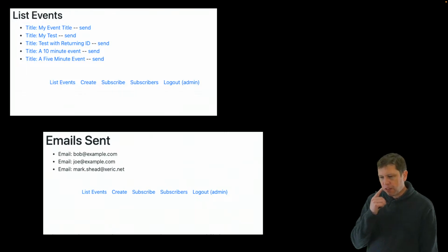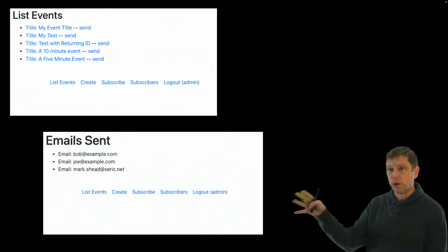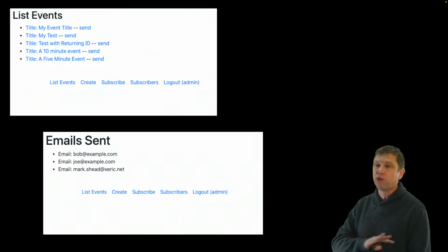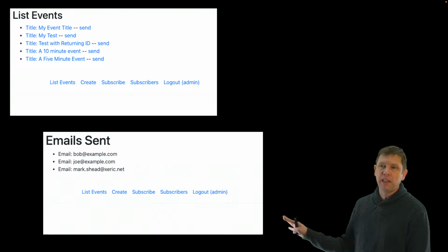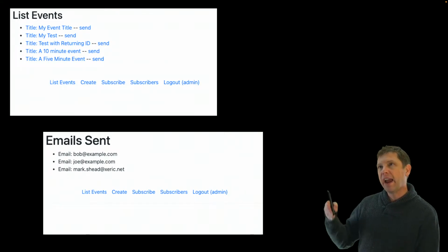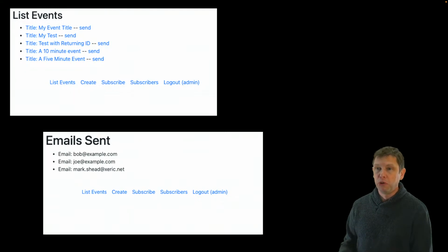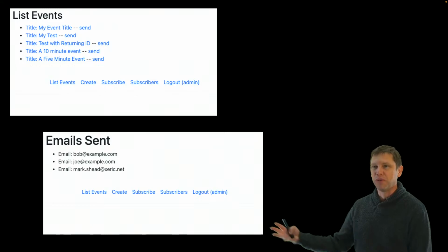The conversation I usually have is, first of all, Agile says you should be working together with those business people daily, right? So if you're not at least having a daily touch point, them being at the stand up or something like that, then you're actively avoiding following one of the Agile principles, which you can do, but you should expect that you're not going to have the same agility that you would have if you're working with them.